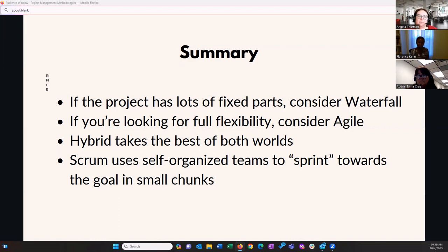So not only the resources as in who are the team members who are actually going to be completing the tasks that are in the work breakdown structure, but also any other resources you might need, like machine time, materials, testing resources. So let's say that you're doing some kind of quality test and you have to reserve lab time. All of that has to be planned as well.